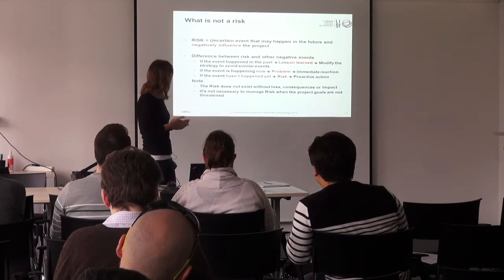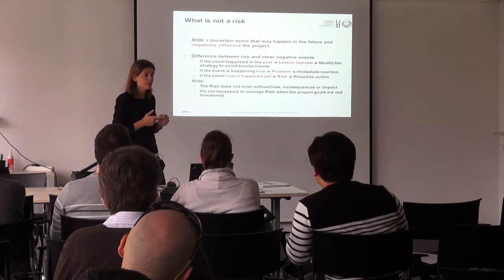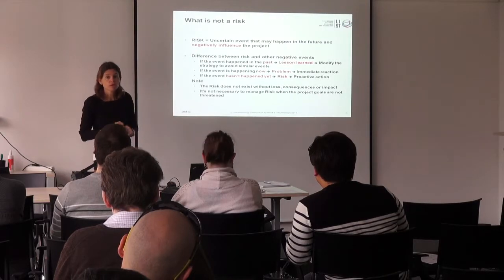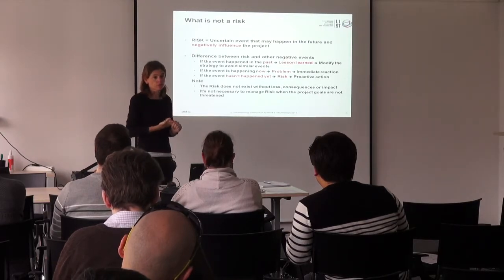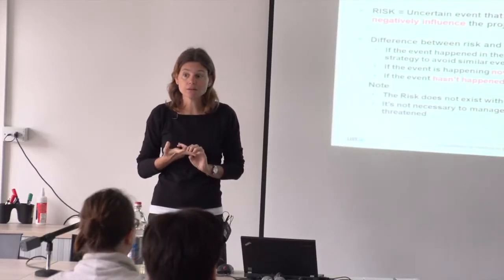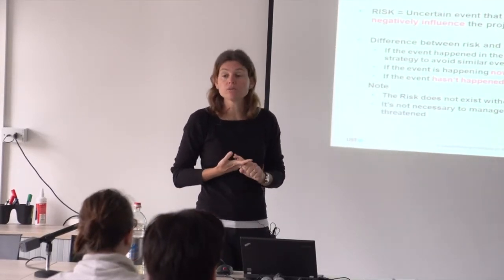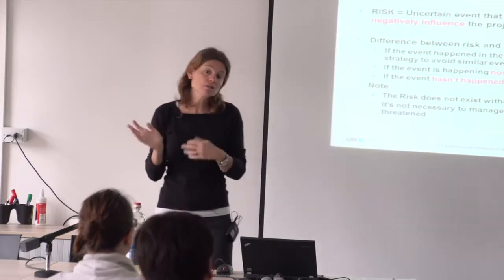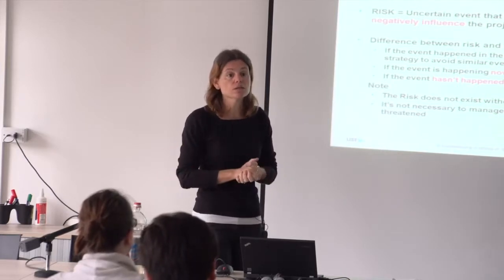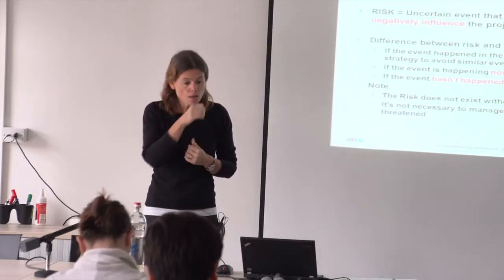Okay, so what is not a risk? As we said, a risk is an uncertain event that might happen in the future that will have a negative impact on your project. This means that an event that is certain, that is already there, is not a risk. It's a problem that you need to find a solution to. But it's no longer risk management, it's something else. It's project management, incident management, taking care of the problems that you currently have on your project.